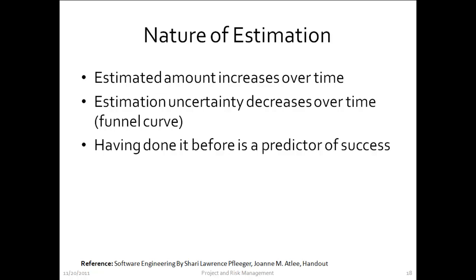Keep in mind one important thing about the nature of estimation in software projects. The estimated amount generally increases over time and rarely reduces. If estimation followed a standard normal probability distribution, you'd estimate low as often as you estimate high. But in software projects, as the project progresses and estimation gets better, the size almost always grows and rarely shrinks.